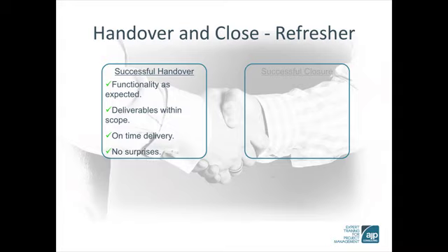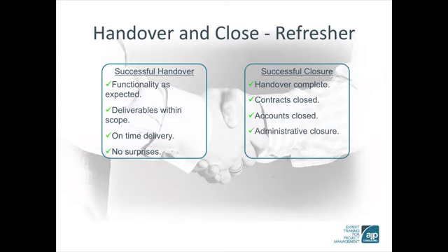Successful closure is dependent on a successful handover, but also the closure of all contractual positions, costs, facility and resource accounts, the completion of administrative deliverables like reviews, lessons learned, updating organizational process assets, and filing.